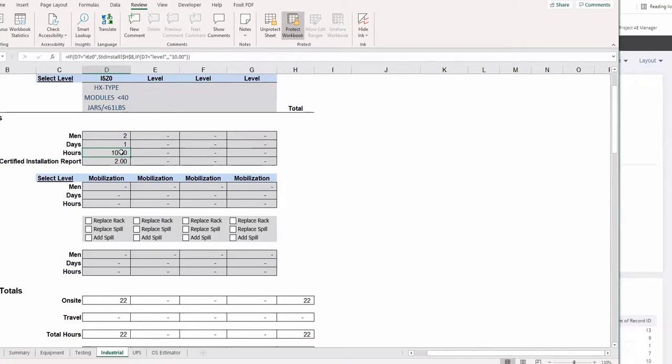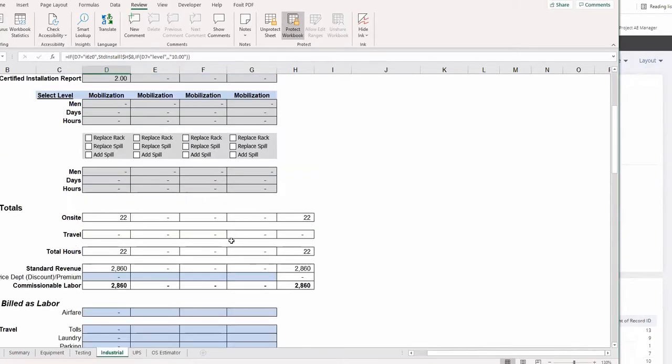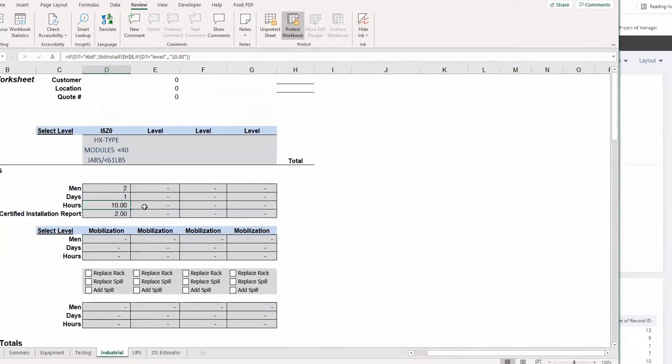So we're building those 2 hours in, for one, because it's the customer's fault, not ours, that we're having to sit there for 2 hours waiting on them to get us back there. And then for two, we still need the 8 hours to get done whatever it is that we're doing. So we build in those 2 hours. So a day rate is really 8 hours with 2 hours cushion for things that are outside of our control that because of the customer we're having to do.